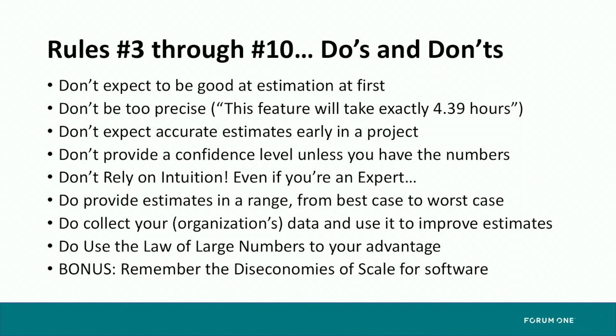So one of Steve McConnell's top recommendations is, do not do that. Walk away from that meeting, sit at your desk, and for 15 minutes think about the project or the feature that you're developing. And write down the 3 things, whatever that number is, that you know you're going to have to do, and come up with a considered estimate instead of shooting from the hip.